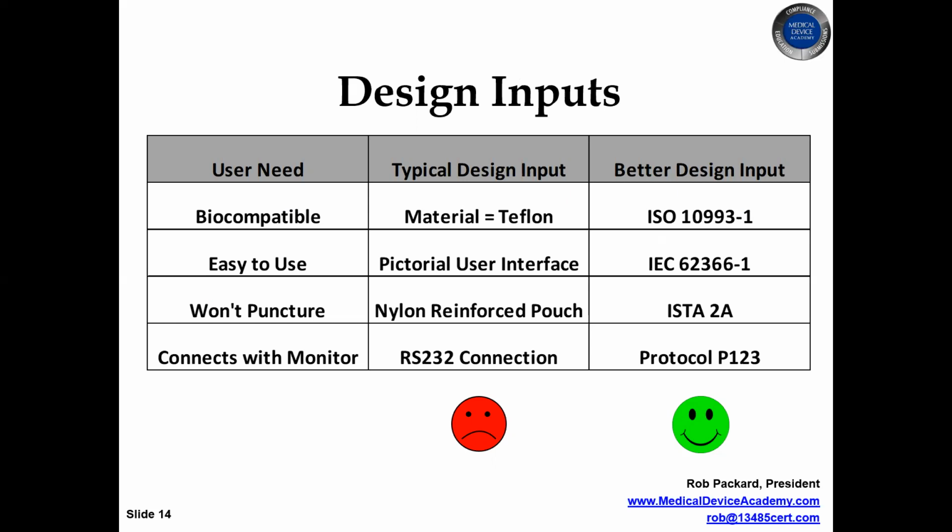And so just because your specification matches your input doesn't mean you did it correctly. Your design input has to be something you're going to test. It has to list the acceptance criteria. A AA battery, people say, well, I reviewed the outputs and they match. It was a design review. We just reviewed the specifications and everything looked good, or we did a print review.